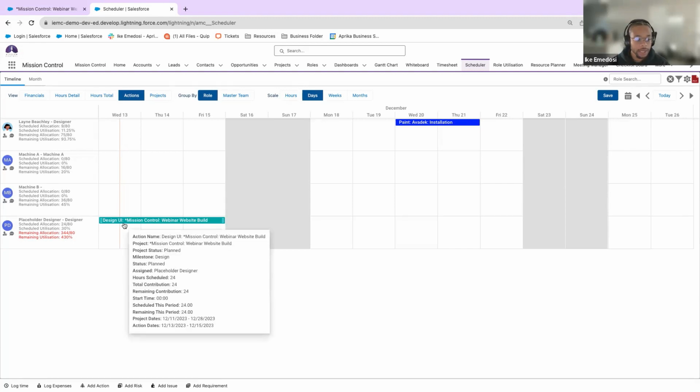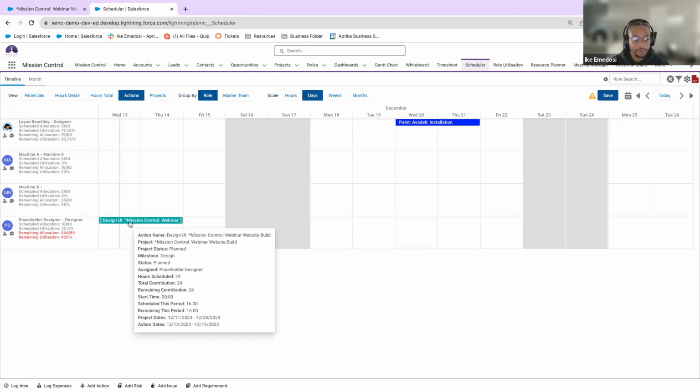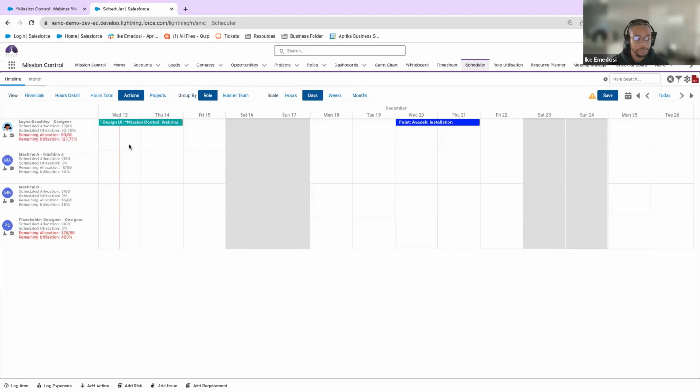But let's say we have our design UI webinar website build, which is this. I can quickly drag and drop and give it to Lane Beachley. And now we're seeing how our hours have been impacted. So I'll take this off again. We can see that she has 9 hours and 75 hours of backlog, essentially. This task is going to be 18 hours. I think I did my math wrong, but you get me. So she had 9 plus 18, 27. And then, of course, the remaining allocation went up as well.